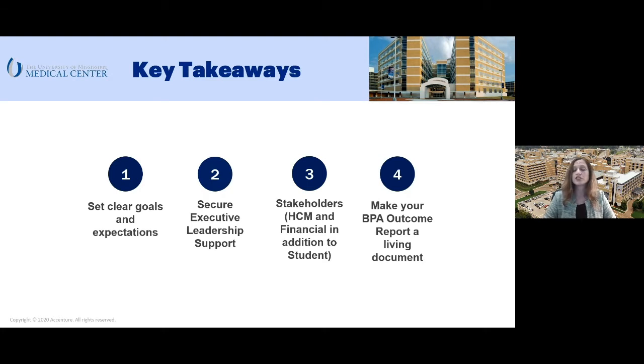Securing executive leadership support early is really important as well. For UMMC, this was a really significant time commitment. In any given session, we had probably 20, if not 40 or more people sitting in the room, and that included deans and directors and managers among staff as well. So we needed to be sure that our leadership found enough value in this process that they would free us up and give us the time that we needed to be able to participate.